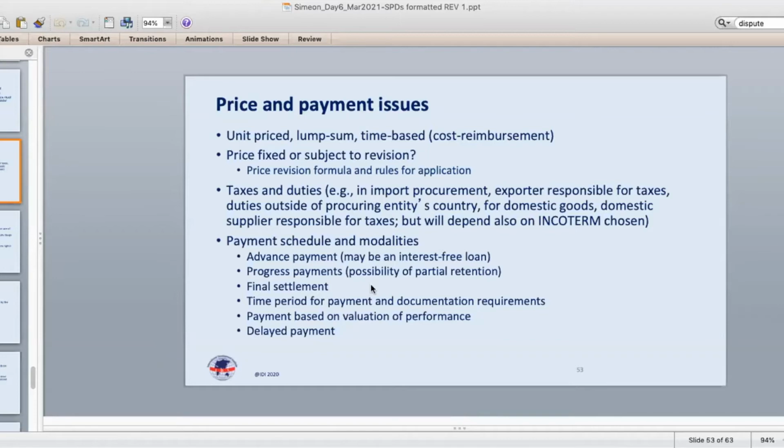In addition to Parsu sir, in the Melamchi project there are a lot of problems, like resettlement problems. Initially, land acquisition was also problematic in this project. Similarly, social costs like school establishment, road establishment, and other social activities are added to the project cost. Similarly, environmental issues are there. Another problem is the conflict situation in Nepal in the name of civil war.